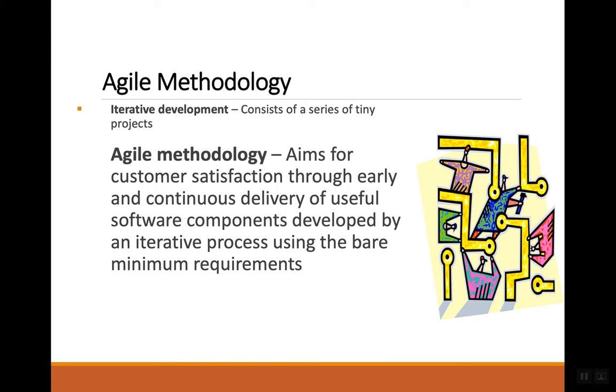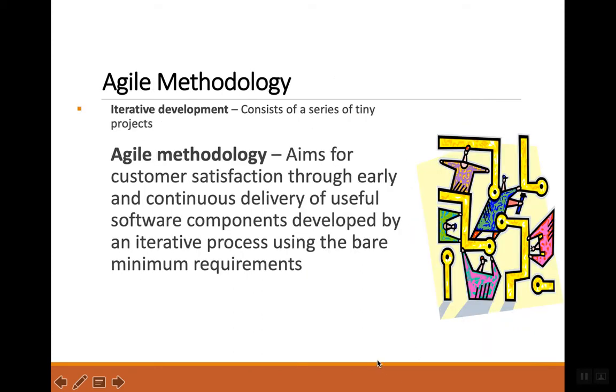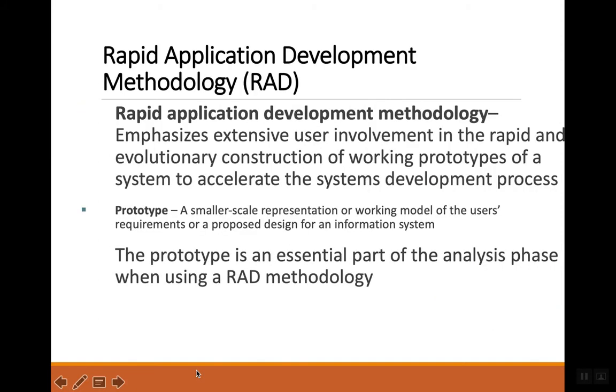The other thing that's noteworthy about agile is that it also assumes very tight customer engagement, whereas with waterfall, a lot of the customer engagement gets handled in this stuff right here, and then from this point on, it's really kind of hands-off. In agile, the stakeholder, the customer, is involved through this whole life cycle. All right, so it's the idea of building it and then building more of it, and then building more of it, and building more. So it's really what we call this iterative approach.